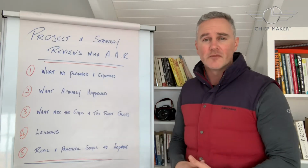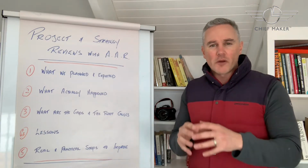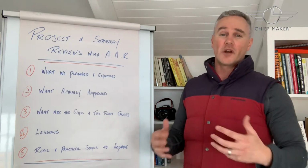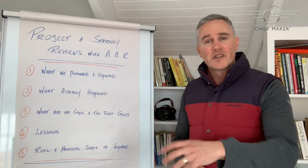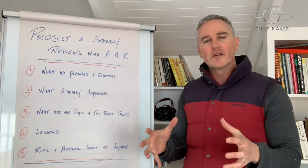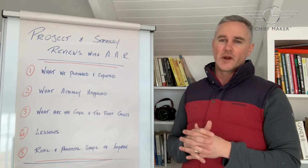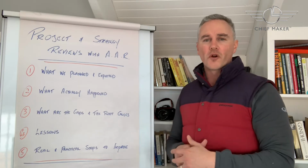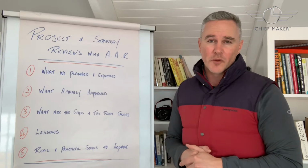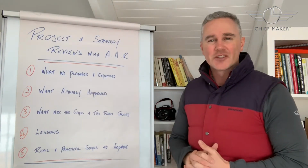So in the case of my client, we would sit down, have a role clarity, have a task alignment type discussion, be real, frank, authentic, get to the root cause with the frame of trying to get things back on track. With the projects, it was reconduct the project prioritization type work and get the right suite of projects, the right program of work with reasonable timelines and resource allocation done correctly, and that actually make a bit more progress than they really did. Part of that one was expectations of the program of work were just simply too high to begin with.